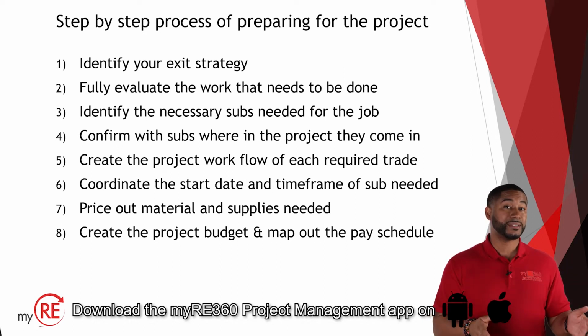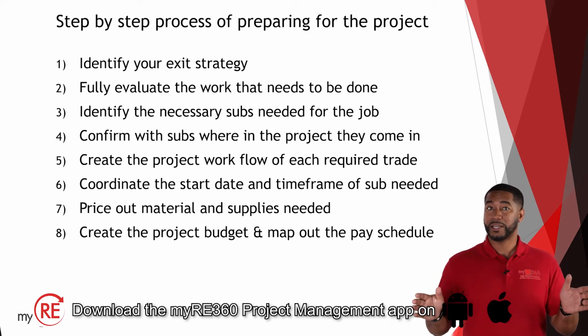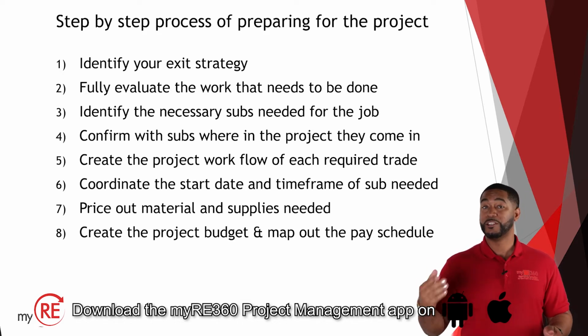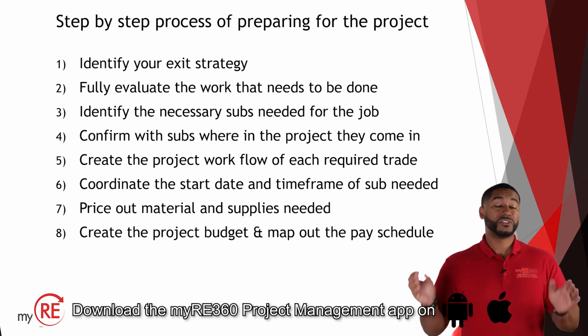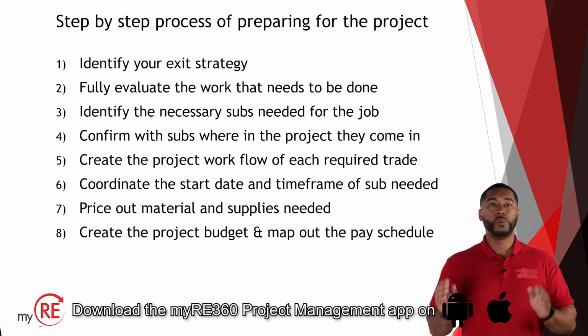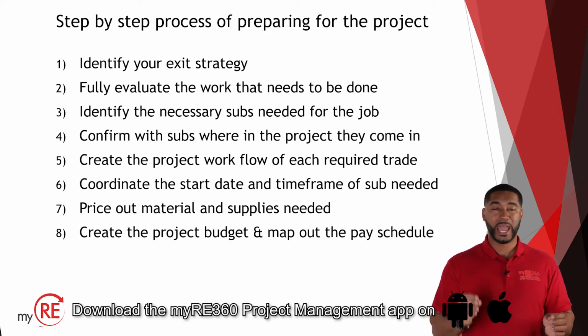And again, as part of being your own general contractor, the expectation is for you to understand the lender draw process. And again, this is advanced education, so it's very important that you understand all of the different ways these subcontractors are typically used to working with general contractors and the way they expect to get paid. So if they're expecting to get paid every week or every other week, you want to make sure you properly budget and account for their requested pay schedule.